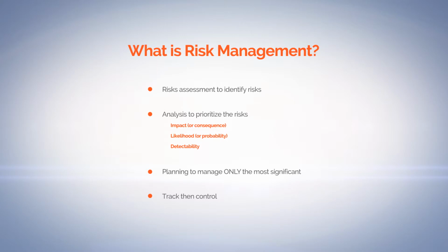So impact and likelihood, they're fairly straightforward. What impact would it have if it happened? What's the likelihood of it actually happening? The FDA threw a slightly curved ball into the whole thing a couple of years back when they started saying, and what about detectability? Okay, well, all right, detectability. It actually doesn't make it more difficult. It does mean that you've got another parameter you can potentially target with some activity, but analysing it by impact and likelihood and the potential for detectability.